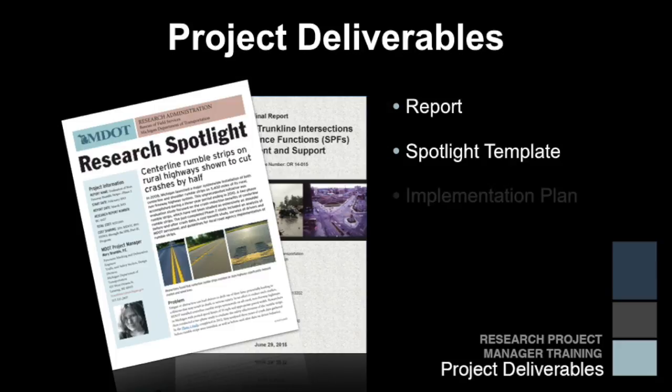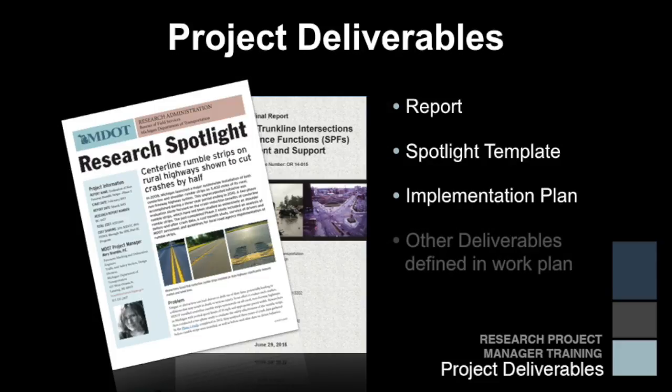Next, all projects require an implementation plan. The principal investigator will provide an implementation plan that spells out the next steps MDOT can take to use the technology or knowledge developed by the research. Finally, many projects have additional deliverables that need to be turned in at the end of the project, like software, design guides, or specifications, to mention a few. All of these deliverables need to be submitted and reviewed in the final months of a project.